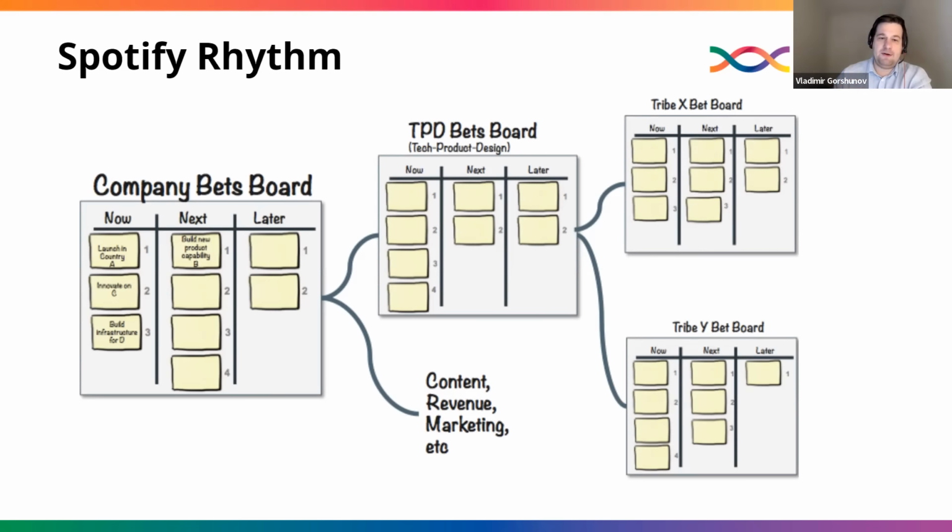In parallel, they have content, revenue, and marketing metrics that are actually represented by KPIs, like run-business-as-usual activity. So putting it all together is quite straightforward for any agile specialist. You have a hierarchy of the requirements, you have visualization, you have feedback loops. You know what you're doing now in this quarter, you know what's planned for the next quarter, and everything else is rolling wave planning, which can be a multi-year roadmap of what you're trying to achieve by making those bets. And bets equal OKRs from this point of view.